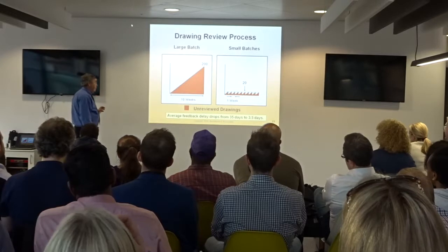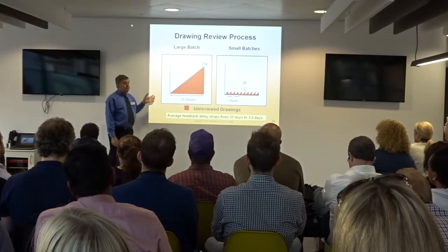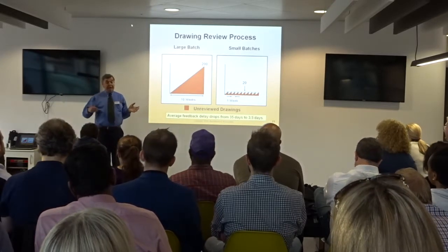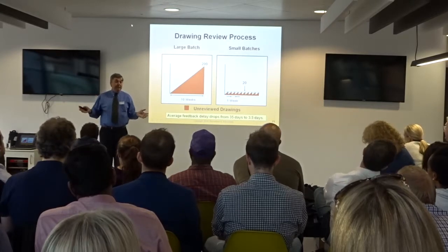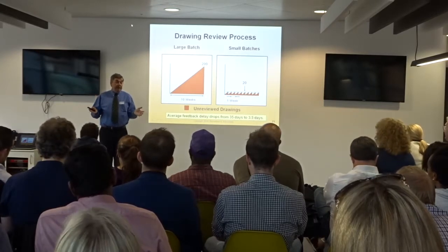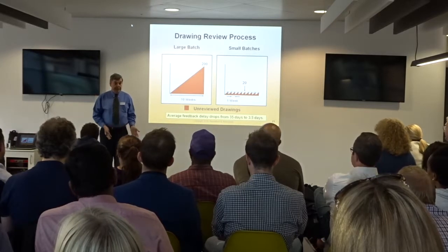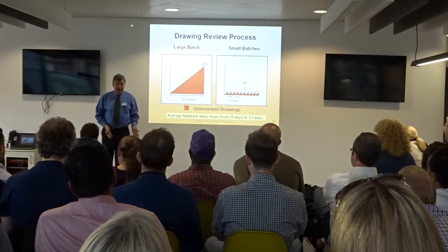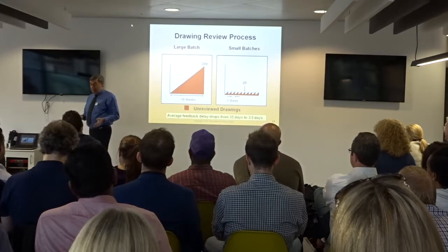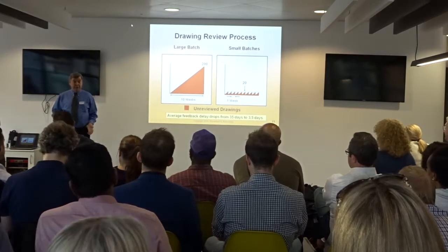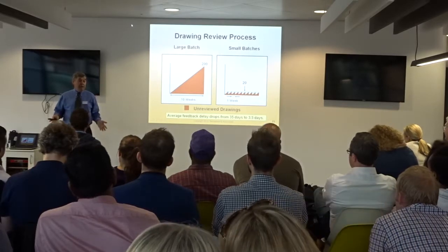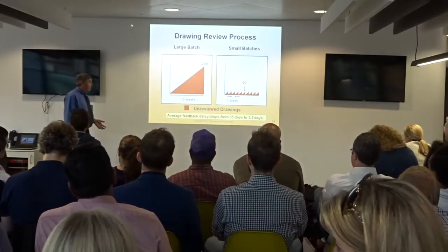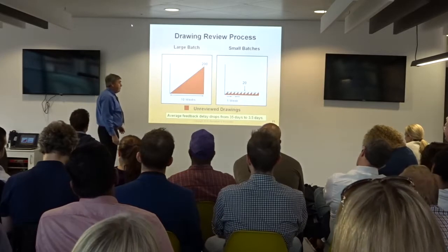Just the way in software, if you make a bad assumption about a protocol and you wait 90 days to get the test results, you embed the bad assumption in 90 days of code. If you give people feedback 24 hours after they wrote the code, there's some chance they can remember what they were doing 24 hours ago, and they stop making the bad assumptions. So you get much higher quality when you accelerate feedback, and that's done by reducing batch size.